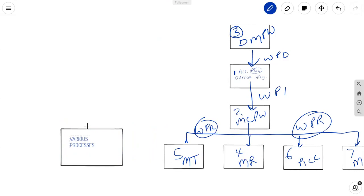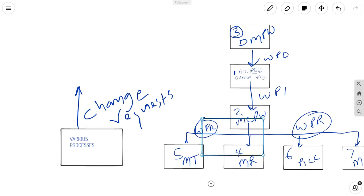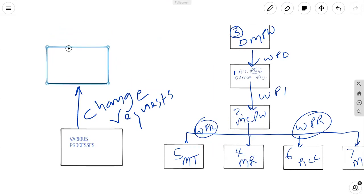Various processes. What do we mean by various processes? It's a catch-all for many things. However, I wouldn't link the various processes to this image. Now, what this is trying to tell you is that various processes give you change requests. Those change requests go to the process that you know as perform integrated change control.